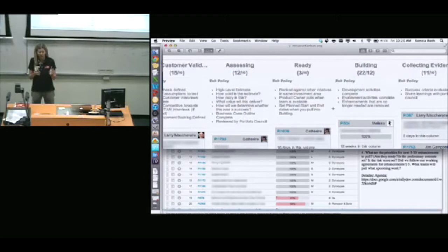So we have mother strategies, true north and mother strategies for the year, and that's what we as a company are trying to accomplish. And so then those of us who are building software or building new services or figuring out how to support our customers are looking to do the initiatives that support those mother strategies. So as a developer, looking at Rally, I can click on any one of these things and look up the tree and figure out, is this initiative we're working on something that furthers one of the mother strategies? Or is it something else, right? Is it operational? Is it efficiency? You know, something like that, right?